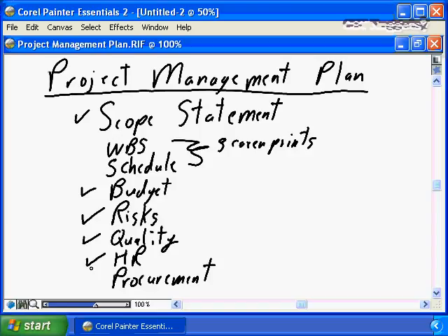I'm going to draw a dotted line through my project management plan right here and say all projects, no matter the size, no matter the complexity, no matter the business importance to the organization, need to define a scope statement, need to have the appropriate definition of the WBS and the schedule. Again, I like screen prints from Microsoft Project. They need to identify and define the project budget, and need to identify and define the strategies being used and the contingency required to support project risks. All projects, all project management plans need that level of detail.